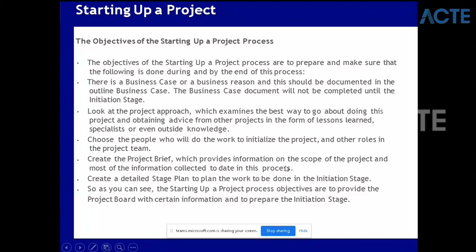You create the project brief which provides information on the scope of the project and most of the information collected to date. Then create a detailed stage plan to plan the work to be done in the initiation stage. The bottom line of Starting Up a Project is to provide information to the project board to approve or not approve, and to be prepared for the initiation stage. Generally, if a project is one month long, starting up the project could be just a kickoff of two to three hours.